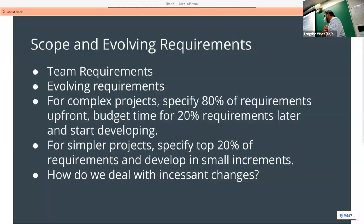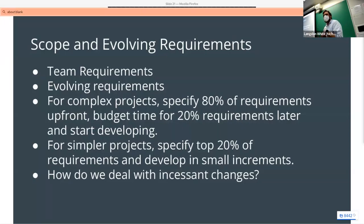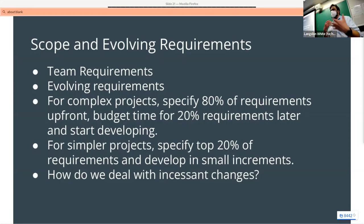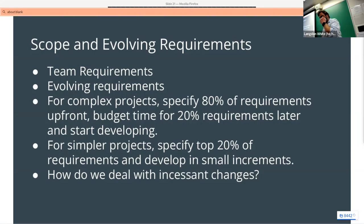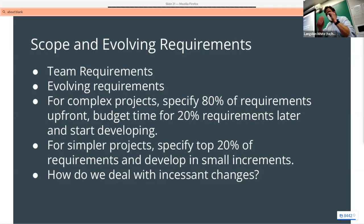How do you deal with constant change in requirements? The trick is usually to write things down: when you come up with a user story, identify what it is, write it down, and get the client to sign off — get them to review it, make sure they understand it, give their feedback. When they try to change it, talk about it and recognize it as a new piece of work rather than just adding it onto the existing one. Make it a new piece of work and let them prioritize it individually.